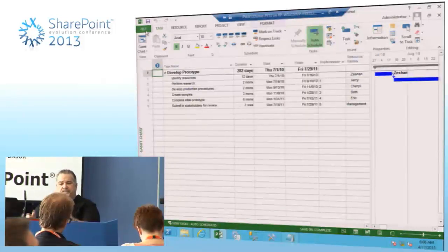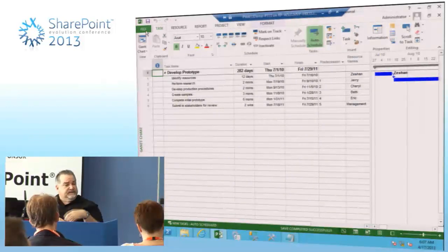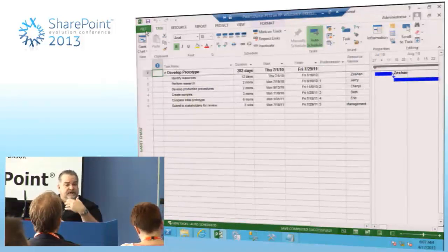Now, the next thing, when you save a file, if you're the project manager, that is viewable to you alone, nobody else, okay? Except for the administrator, I should say. But if anybody else were to say, hey, I thought you worked on that file and how come I don't see it? It's because you haven't published it yet, okay? So it's the same concept of publishing documents in SharePoint. If you don't publish it, you don't see it.